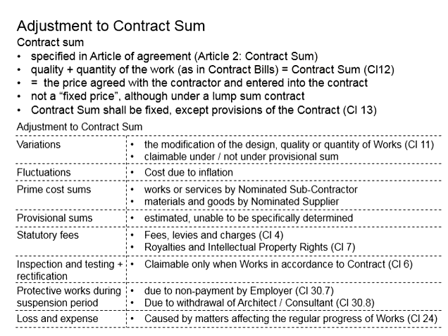The main point here is that the contract sum is a price agreed between the contractor and the employer for the entire project. This is a lump sum project, but the price as specified in the contract sum is not fixed due to variations in terms of the provisions, as a result of potential changes in the quantities, qualities, or even the scope of the work, which deviate slightly from the contract bills.